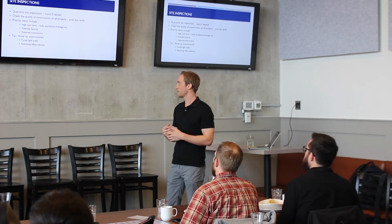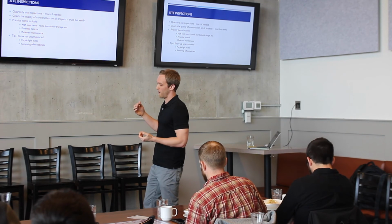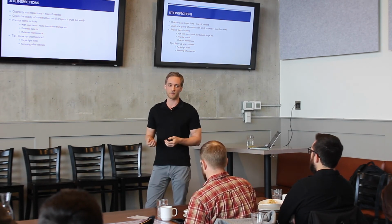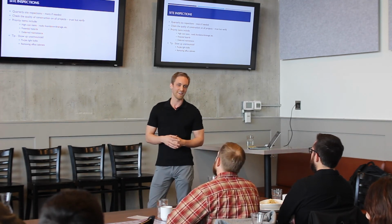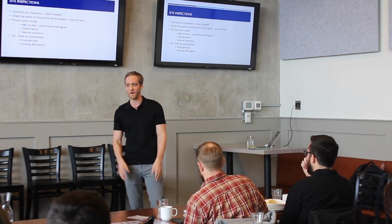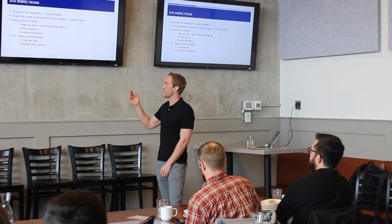When you get a lot of projects up and running, you want to go in and monitor the quality of construction. Trust but verify, we like to say. So for example, on our unit interiors, I'll give a contractor 2 units to renovate, and then I'll fly out and inspect them and just inspect the quality of construction. Maybe they'll knock it out of the park the first time, but we found some sloppy construction quality, and it's just good to set an example. We found a number of things, painting over brand new cabinet hardware. We found drywall screws in the side of your brand new cabinet, things like that. So you just want to set an example and a template really before you give them the remaining 100 or so units. And that goes for any projects that we're implementing.